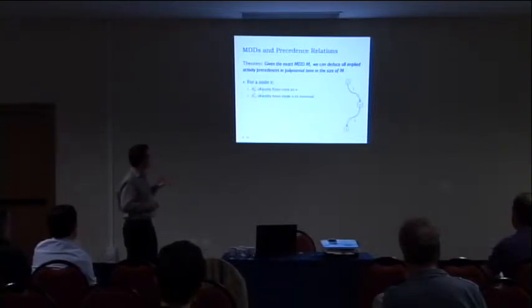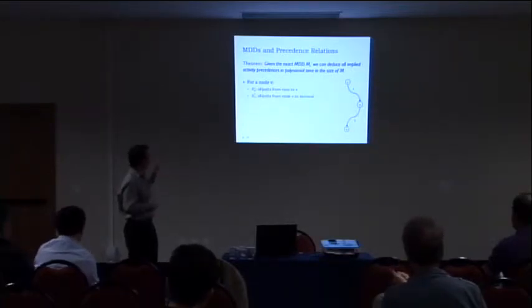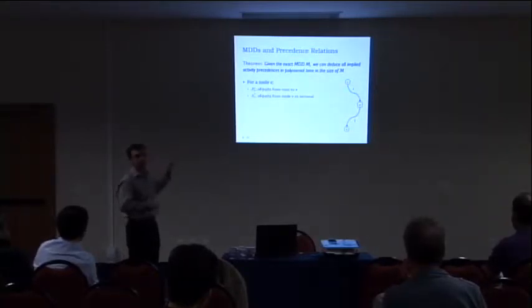So the idea is that suppose that you have a node V. Okay, how do you deduce the precedence relation? Suppose that you have a node V. And you collect from the top down all the state information on all paths, all the labels that are in all paths from the root to V.